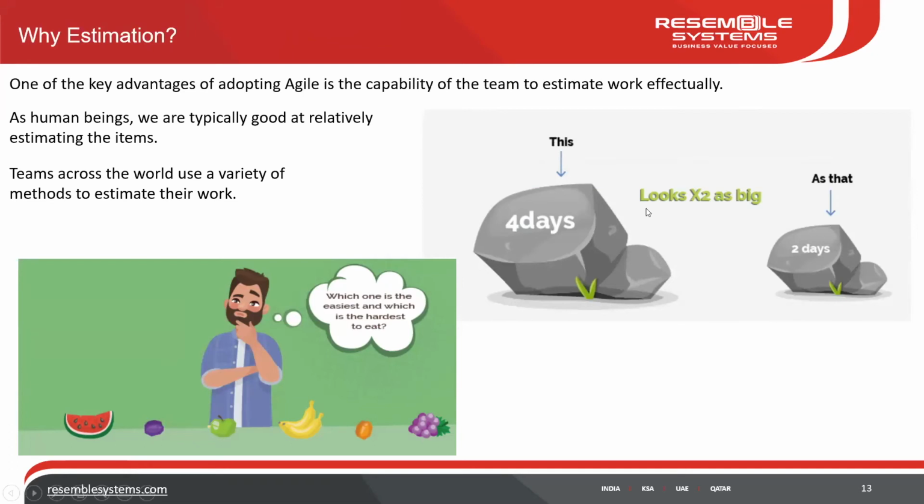So for example, if we show somebody a small rock and say you take 2 days to break this rock, and then I show him another rock and ask how long he thinks it will take to break this, he will see it relatively. Very important word: relate. He will relate this rock to that one and think, okay, it is just twice as big. So if I'm taking 2 days to do this, I will take 4 days to do this, right? So it becomes very easy.